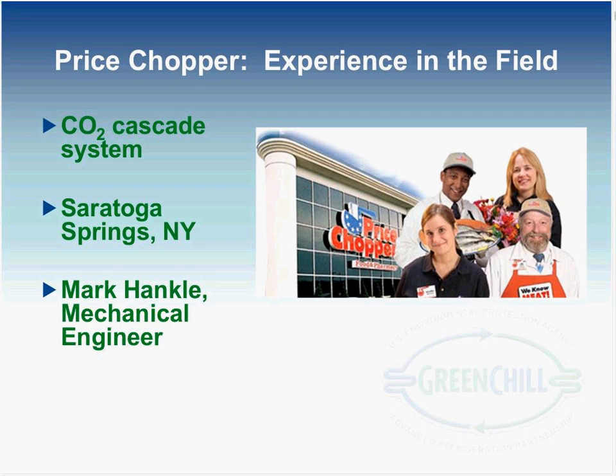Second part of the question about the compressor availability, we have worked with our compressor suppliers to either provide us a spare compressor on site or have one locally available to us in case we do lose a compressor.